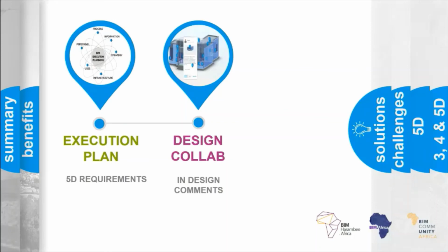By undertaking these reviews, the quantity surveyor can inform the model author as to the objects that do not meet the requirements of the quantity takeoff rules that are applicable to that model's geography. The comments can be linked directly to the objects that are being reviewed, or they can be made generally on the model as a whole. But further, the comments can be addressed to individuals who will be responsible for actioning those comments, and thereby creating an action item list or a to-do list for the model authors that they can work through.